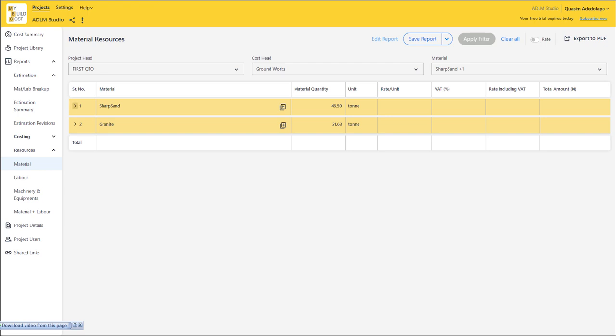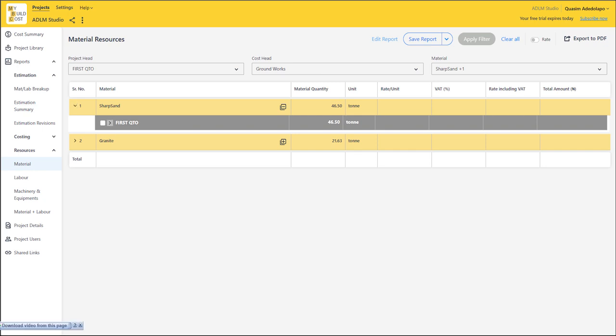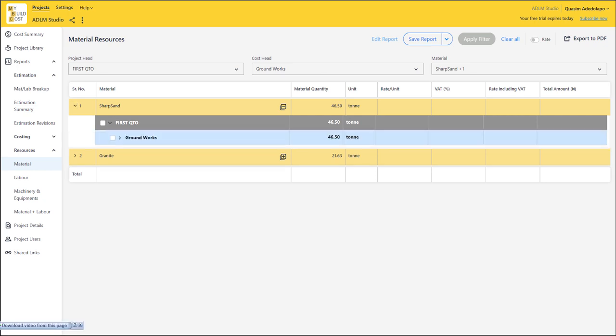Let's see the breakdown. If you click on this, you see the project title and that's our groundwork sub-structure. Let's say we have a complete measurement where we have groundwork, first floor, second floor, third floor, and so on. For groundwork sub-structure, we have 46.5 tons of sharp sand that will be used for just the groundworks alone. If you have first floor works also, that is the way it's going to arrange everything for you automatically.